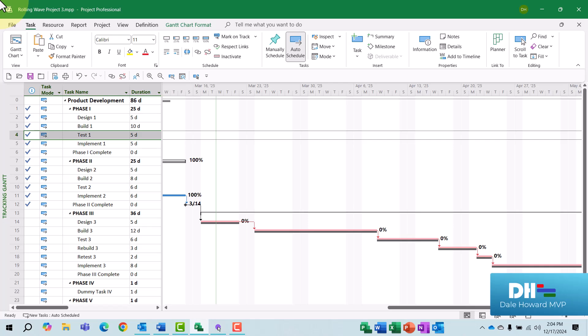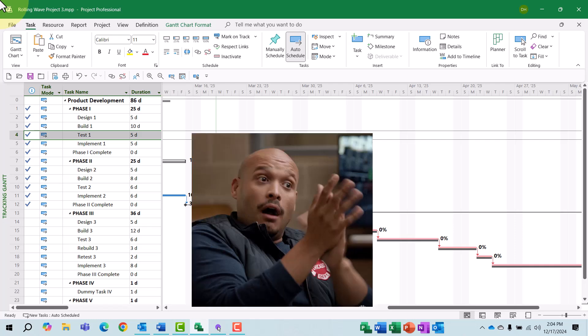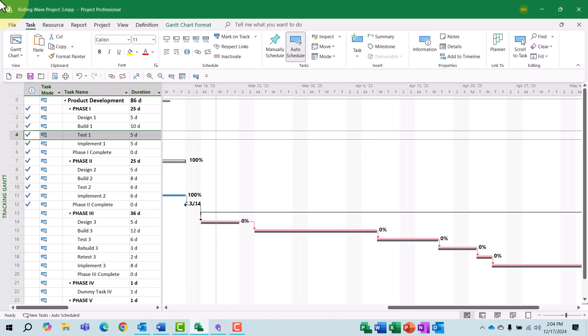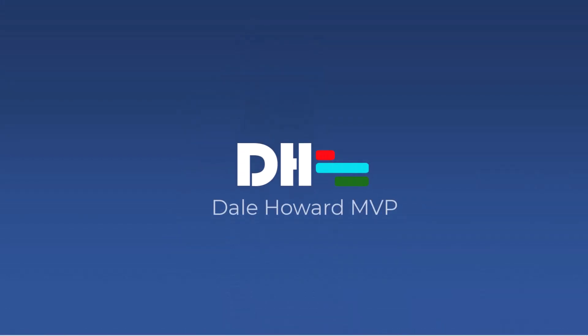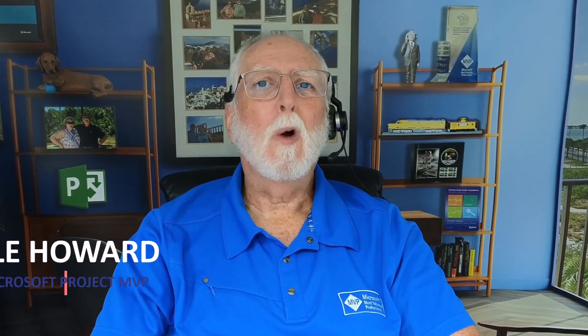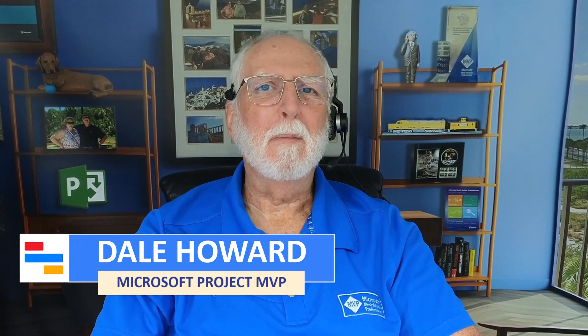So this is how to do rolling wave planning. All I would need to do further is to begin work in Phase 3, completely plan Phase 4, then baseline Phase 4, begin work in Phase 4, completely plan Phase 5, and so forth. That's how to do rolling wave planning in Microsoft Project. Now you know how to do rolling wave planning in Microsoft Project.